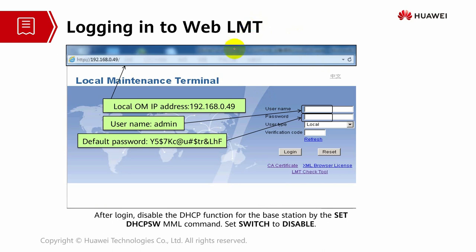To log into the web LMT, use the local IP address, the username, and the default password. This default password can be changed later since it's too long and difficult to remember. When you log in for the first time and are required to change the password, you can change it to a simpler one — but remember to save it somewhere, as engineers often forget it across many base stations. After login, disable the DHCP function of the base station by setting the relevant command switch to disable so it doesn't interrupt the transport service. Once commissioning is complete, set it back to enable.